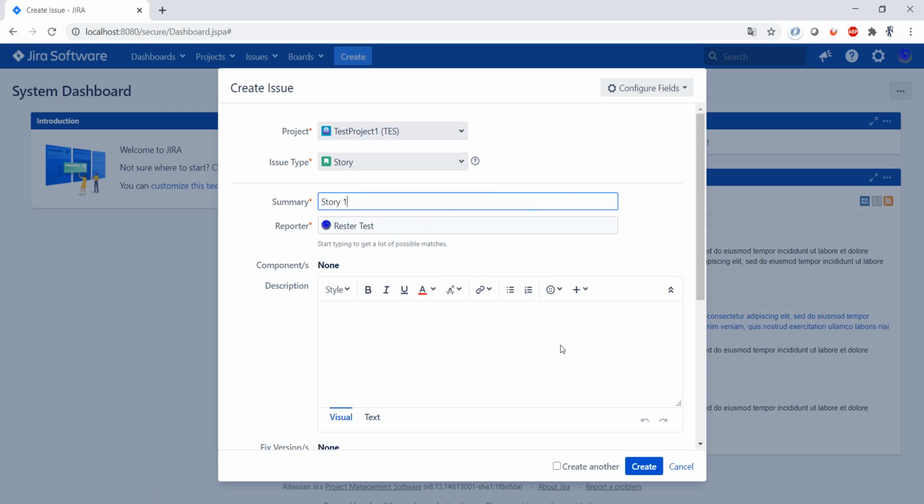From a JIRA item hierarchy, you first have the epics. The epics are covered by stories. The stories have tasks, and of course the bugs can affect everything from epic, story, and task. So in order to keep the hierarchy in JIRA, it's recommended, and I would say mandatory, or should be mandatory, to always assign a story to an epic.